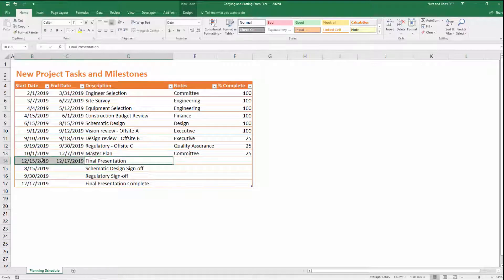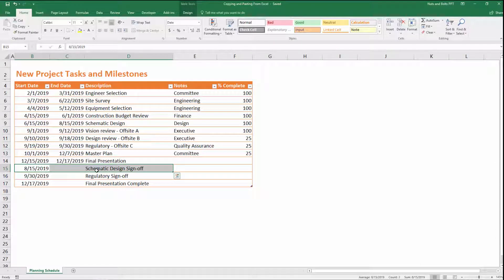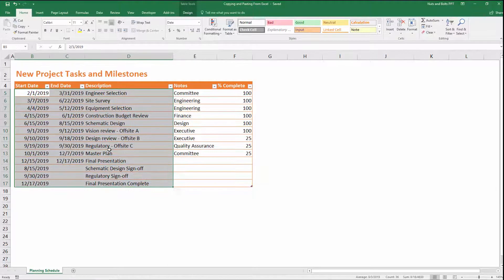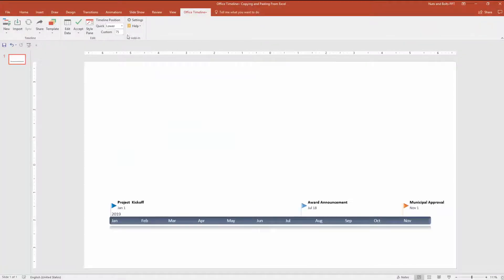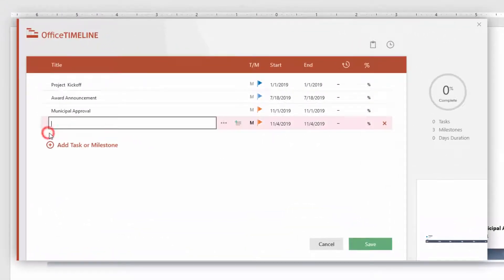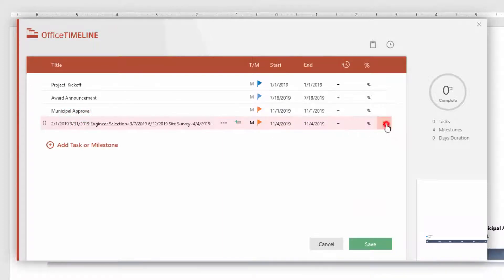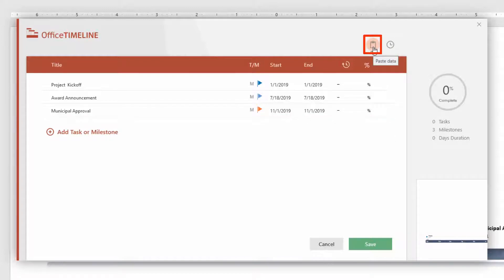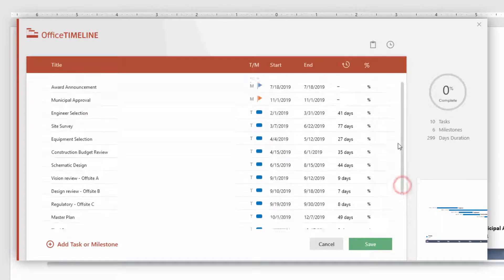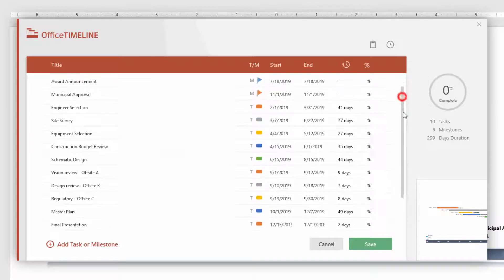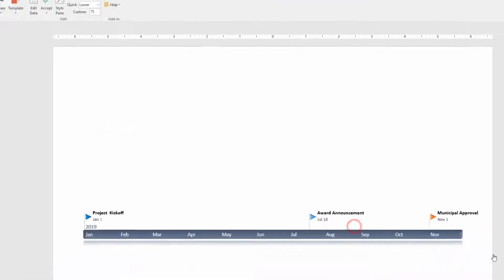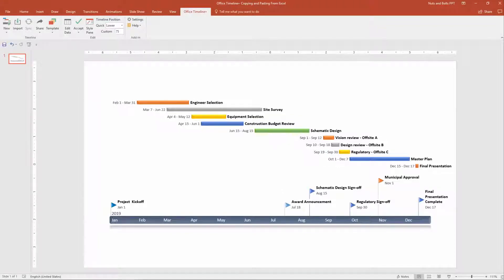One special note: notice that my tasks have a start date and an end date, while my milestones have just a single date. That's how you properly differentiate tasks from milestones when copying data over from Excel. With your data selected — including the start date, end date, and description — hit Control+C or select Copy in the ribbon. Flip back to PowerPoint, select Edit Data, and instead of adding a task and pasting with Control+V (which won't work), select the Paste Data icon up top. Click the Paste Data icon and all of your information will be properly brought into your graphic. Simply click Save, and the add-in automatically adds all your task and milestone data to your existing Office Timeline Plus graphic.